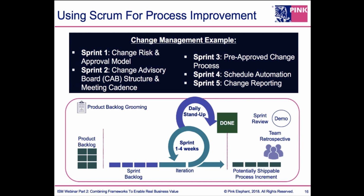All right, so I want you to imagine using these Agile concepts now for more than just build. Let's take it a step further. Let's say we're going to do a transformation project around a process like change management. You could, and many organizations do, say we're going to re-engineer this process soup to nuts, right? A to Z, and we're going to put it in a tool, and when we get this tool all automated and ready to roll out, then we're going to do this massive rollout strategy across the organization. I've been in many of those projects, and that end-to-end cycle time is typically 3 to 4 months before we see any value. A lot of times it suffers from attrition, and the reality is people get frustrated. They're not seeing value fast enough, or whenever it comes out it doesn't meet the need of the organization that originally chartered the requirement.